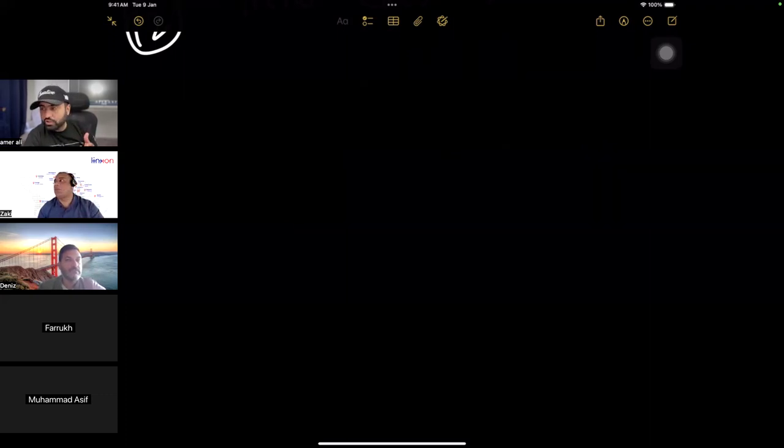But let's say you go to the mechanic shop and he's busy. So you say, hey, can you do it? He says, I will do it after some time. But you are in a hurry. You say, if you can do it right now, I'm going to pay you an incentive. His fee, the cost of the oil, you will reimburse him, and then you can give him some incentive fee. That is agreed. Or if somebody did a good job, you can give him some award, just like a tip. Cost reimbursement, award fee. These are important contracts.